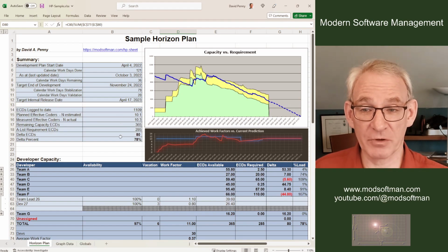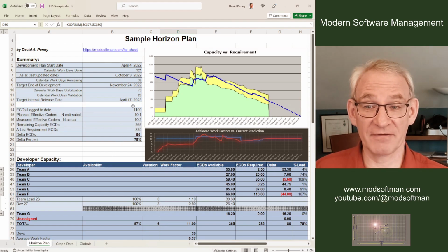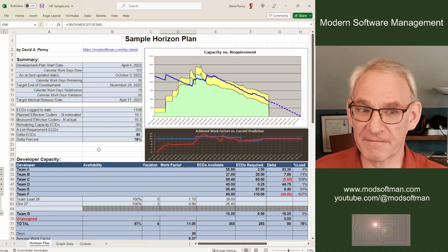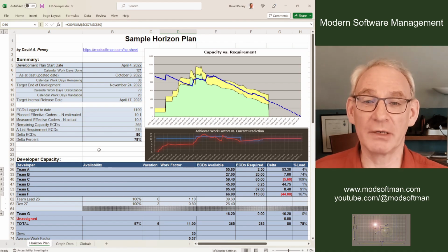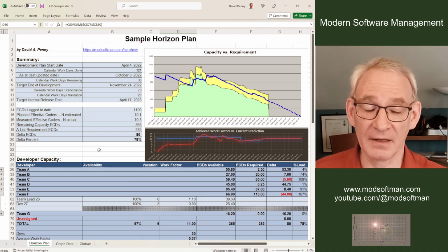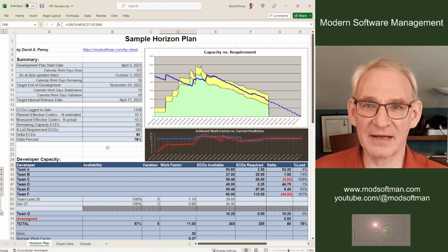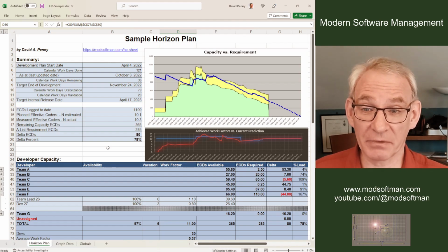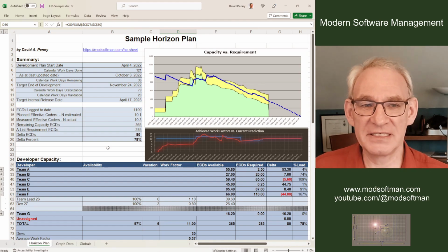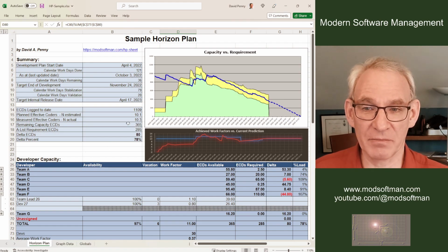The first time you put a plan like this in place, and like I say, if there's a vague notion of dates and feature content, if you actually do this plan, you'll find that there's almost 3 to 5 times more work than you can possibly accomplish. And that's been my experience almost every time this happens. And so when you do this exercise, you then get actually a dose of reality. And now you can manage your company properly and remove all of those dysfunctions I talked about before.